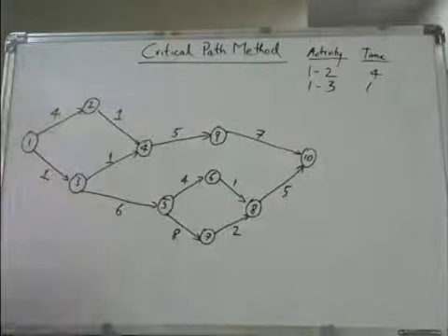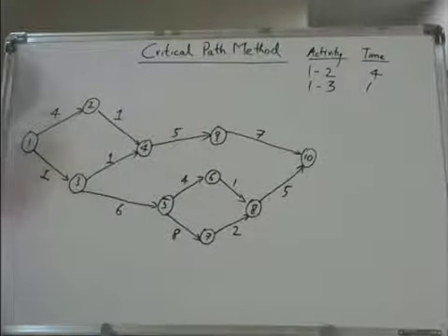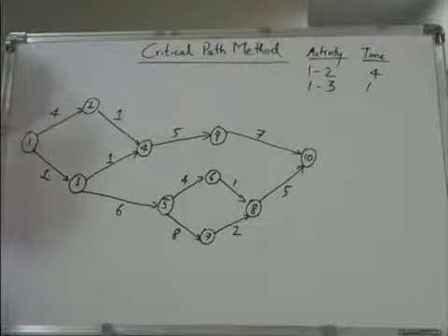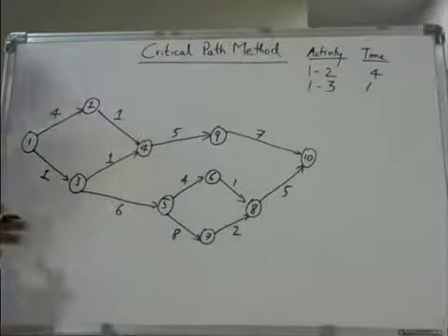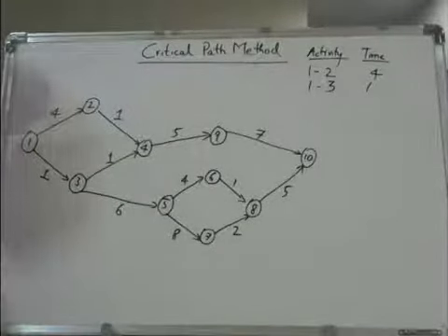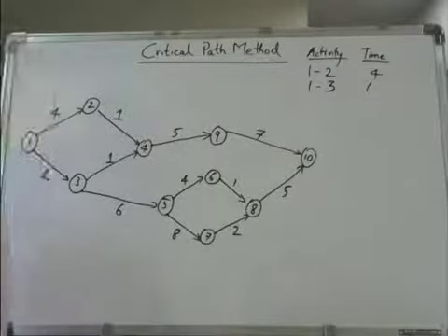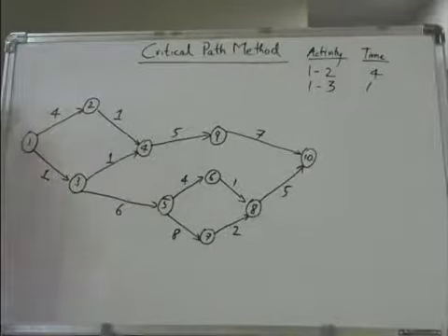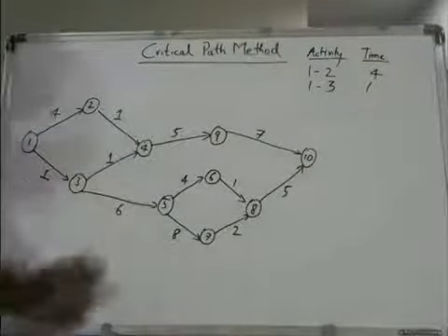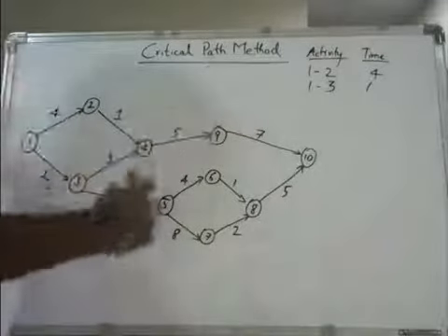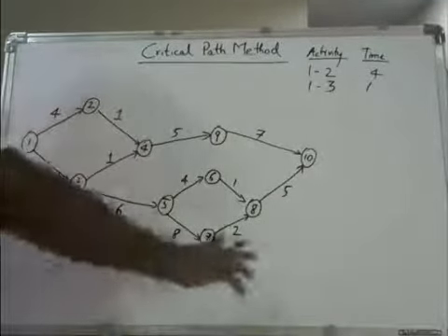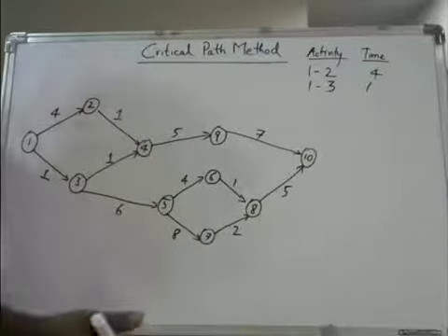Okay. Now, the first part of the problem, computing a network diagram, we have already solved by putting this network. So this is your network diagram. The second step is to compute the earliest event time and the latest event time, which they have asked us to do. So you need to draw a table here, and basically write down what all should be covered in the table.